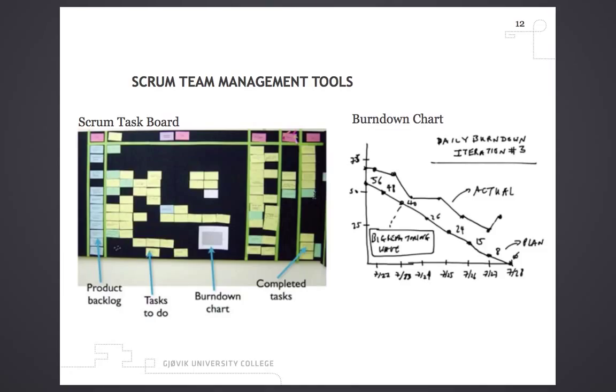What's happened if you have a graph that goes upwards during the sprint? Issues have to be split up into more. Yeah, you have either done a re-estimation of some of the sprint backlog items so that they are larger than they were. Okay, we need 10 hours on this task, not 5 as we originally estimated. Or you have put more items from the product backlog into the sprint backlog. You shouldn't do any of those things, but I've seen it happen in, for example, Jira.